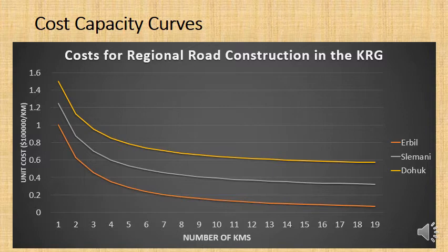So this is a fairly rudimentary way of estimating, but it's often used for early estimates, often when you're making scope definition. Now, a couple of other things. The higher the R-squared value, the more accurate it will be. The more historical data points that you are using, the more accurate it will be. And also, it will be more accurate if you interpolate rather than extrapolate.